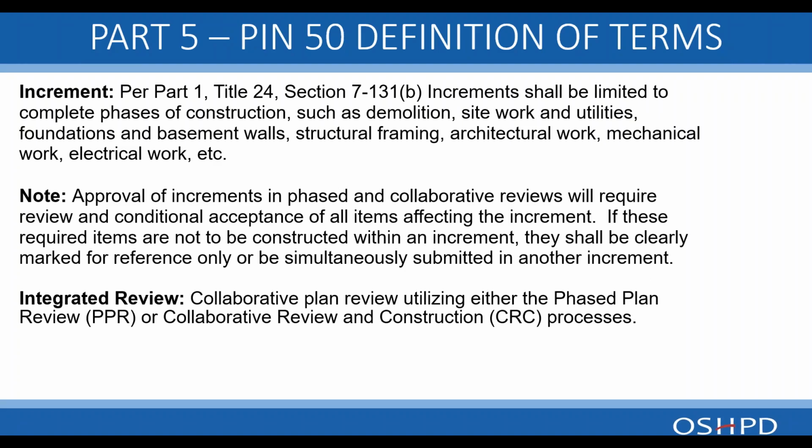An increment per Part 1, Title 24, 7-131B, increments shall be limited to complete phases of construction. So it's important to understand that an increment is a phase of construction and phased review is a phase of design. So they're two different things here.